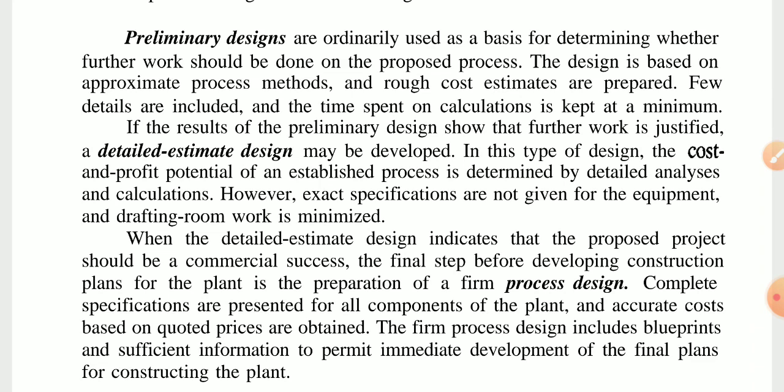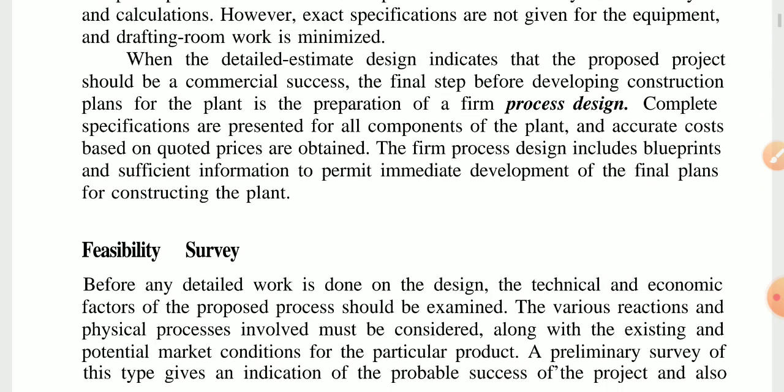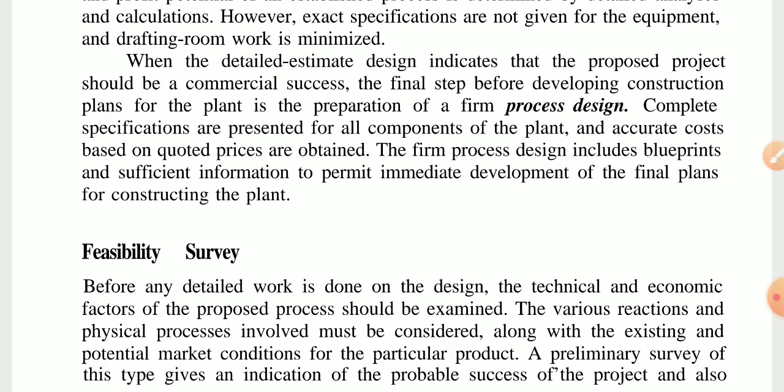A detailed estimate design may be developed where the cost and calculations are carried out. However, exact specifications are not given for the equipment and drafting room work is minimized. When the detail estimate design indicates that the project should proceed, the final step is the preparation of a film process design. Complete specifications are presented for all components of the plant, accurate costs based on quantity prices are obtained, the film process design includes blueprints, and sufficient information to permit immediate development of the final plans for constructing the plant.